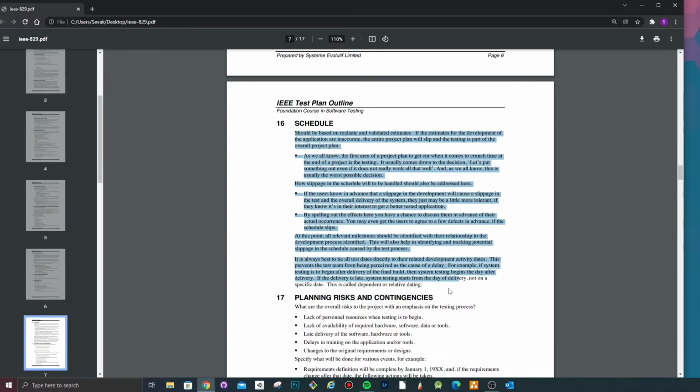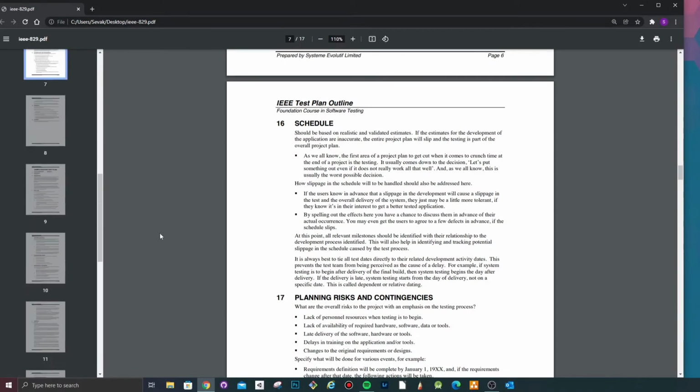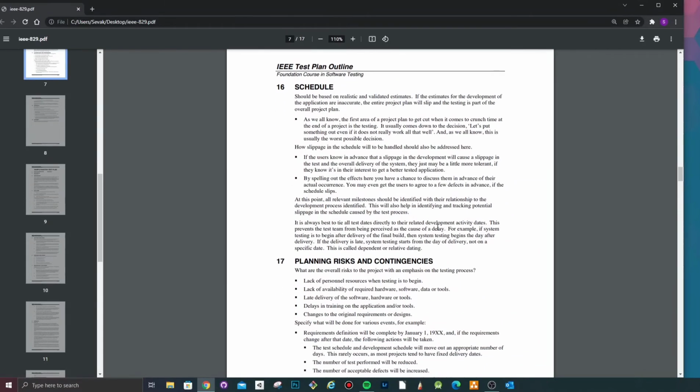And then you might want to mention that you want to have a final phase. In Agile, they would call it something like a hardening sprint, or your regression test phase towards the end of your project, where you make sure that all of the necessary regression test activities are also performed, and you just want to highlight in here when that's approximately going to happen. And this will be a section which will be very tightly linked with the overall project plan when you're describing it.